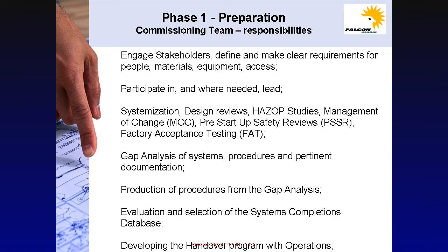Participating in and where needed to lead the systemization exercise, design reviews, HAZOPs, studies, management of change, pre-startup safety reviews or PSSRs, and factory acceptance testing. There will also be responsibility for gap analysis of systems and procedures and pertinent documentation, production of procedures stemming from the gap analysis, evaluation and selection of the systems completion database, the SCDB, and developing the handover program with operations.